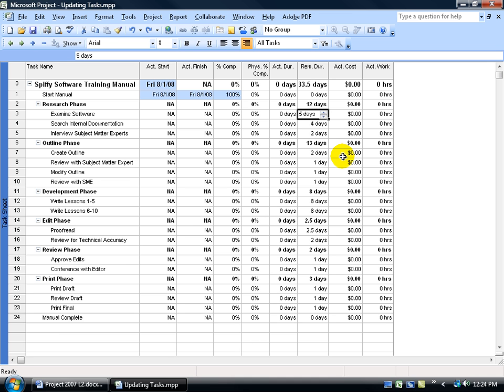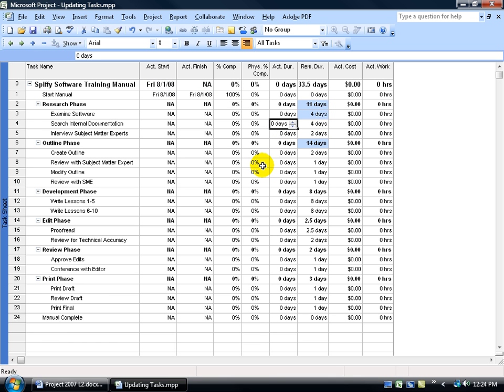We'll leave the plan alone but here in the tracking we'll change it from 5 and click it down to 4 and click off in a blank area. And notice that it shrinks the day for the research phase from 12 to 11 but it increases the outline phase from 13 to 14. Why?